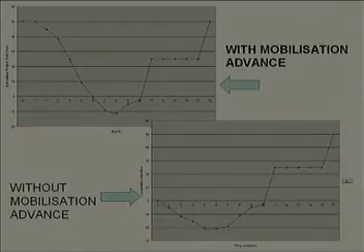That is why you will find that most contractors try to persuade the owners to provide them mobilization advance. Now, you can understand the difference very clearly. If the owners have given you the mobilization advance, you are experiencing negative cash flow for a very short duration.